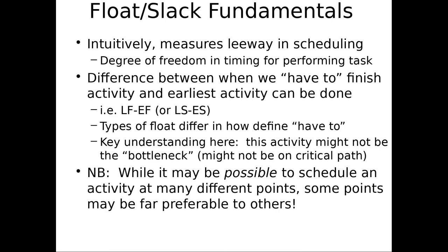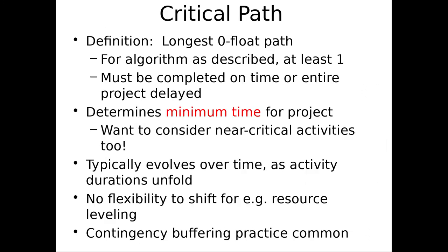Okay. So this notion of float and slack, that's just the late finish minus the early finish, or the late start minus the early start. It's the degree of freedom we have, right? And on the critical path, it will be what? Zero. Be zero, okay? We have no give. We have to start it as soon as the earliest time we can start it. Yeah? Does that make sense? Okay.